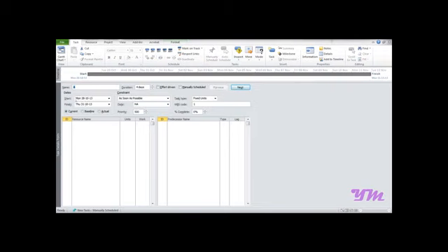Now in Task Detail Form, here we have the name of the task, here we have the duration of the task, and dates, constraints, task type, WBS code and all other things present over here. The very key point is to always assign the resources to the tasks in Task Detail Form. Point 2: note that effort driven is always deselected.